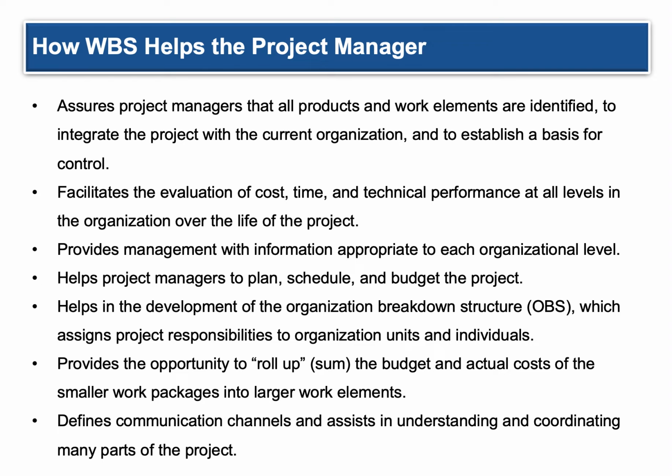It provides the opportunity to roll up or sum the budget and actual costs through smaller work packages into larger work elements and ultimately a price tag on how much the project's going to cost. It defines communication channels and assists in the understanding and coordinating of many parts. Much like most of the courses I teach, I'm just trying to get you to think. And within that, you need a structure to help you think and organize your thoughts.